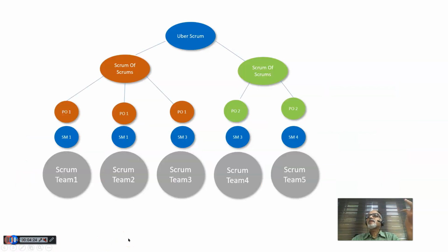Now, sometimes we may go for agile project management. Again, we have to decide, because there we are talking about a maximum team size of 10. If I want a 50-member team to operate on a project, I should form 5 teams of 10 members each, and each team will have a scrum master and a product owner, and every day there is a stand-up meeting, and the scrum masters should have a Scrum of Scrums.